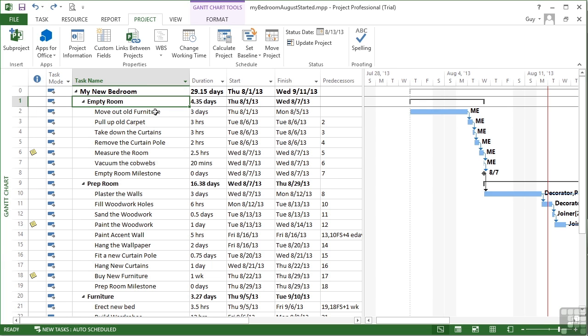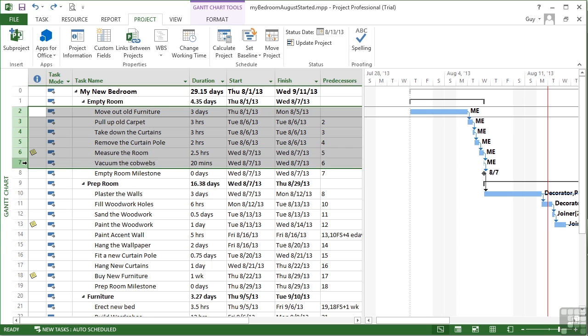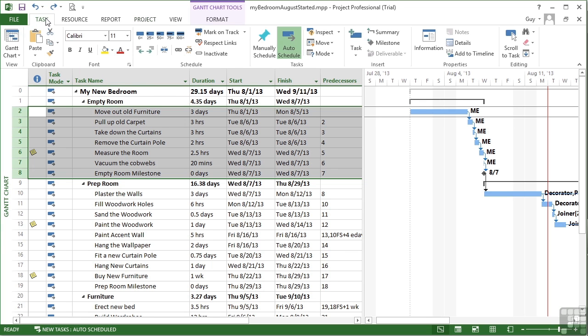An alternative would be to manually select tasks. So let's pick on the first ones there, first set in MyEmptyRoom. Go to the task ribbon and choose 100%. They all get ticked, progress bars appear and everything's happy.